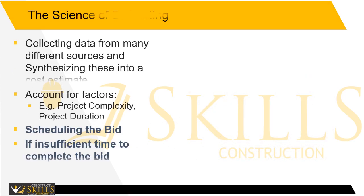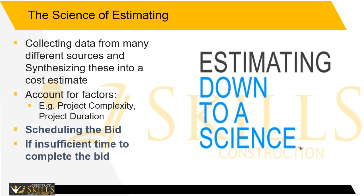The science of estimating. Estimating is a process of collecting data from many different sources and synthesizing these into a cost estimate. The estimator must take into account factors such as historical estimates versus actual costs, subcontracted bids related to the proposed scope of work, current and historical prices for materials, and job-specific requirements related to wages or materials.